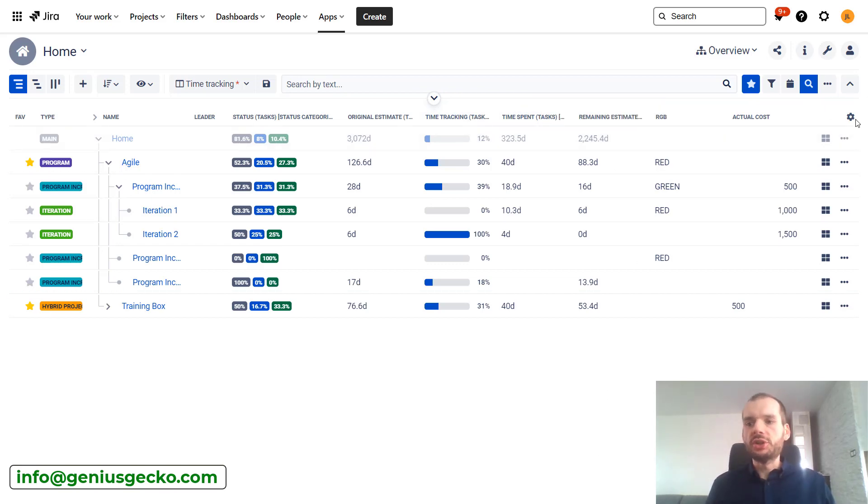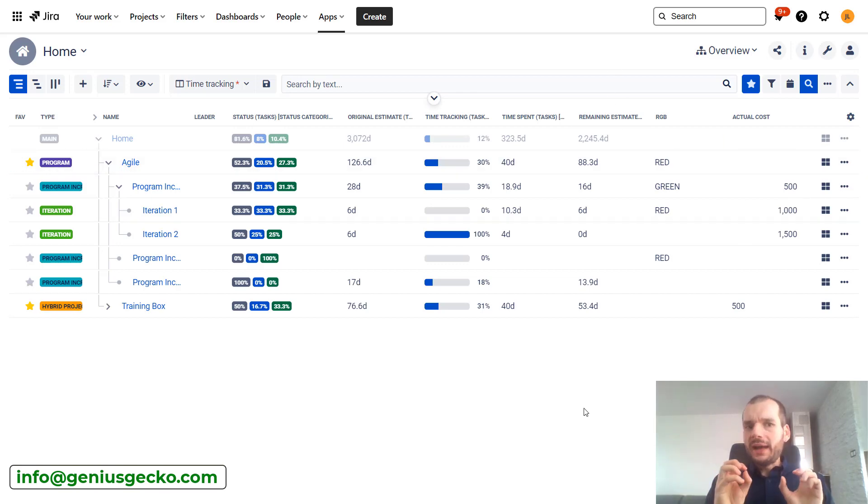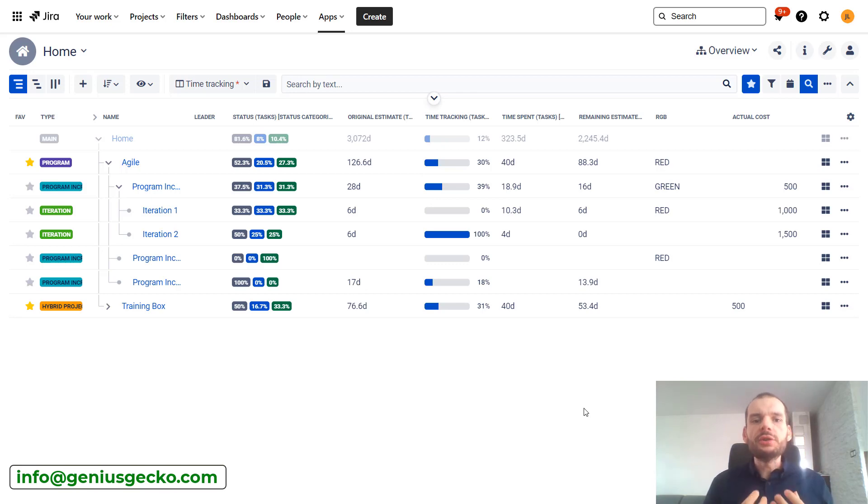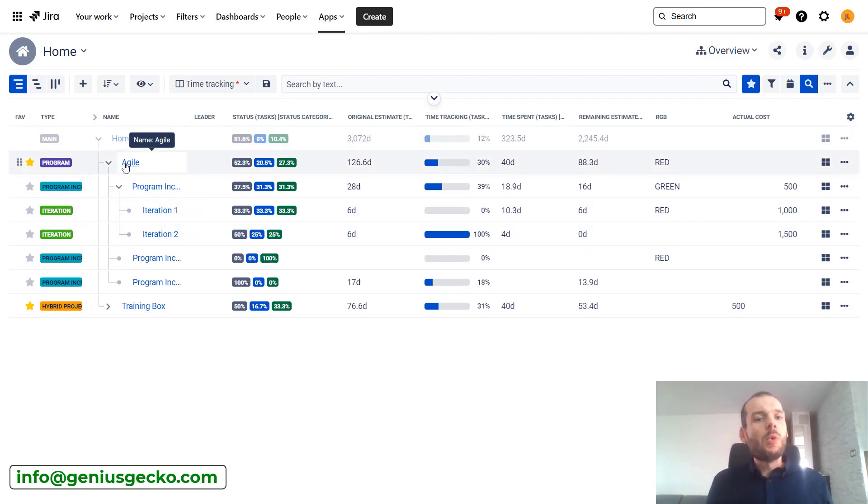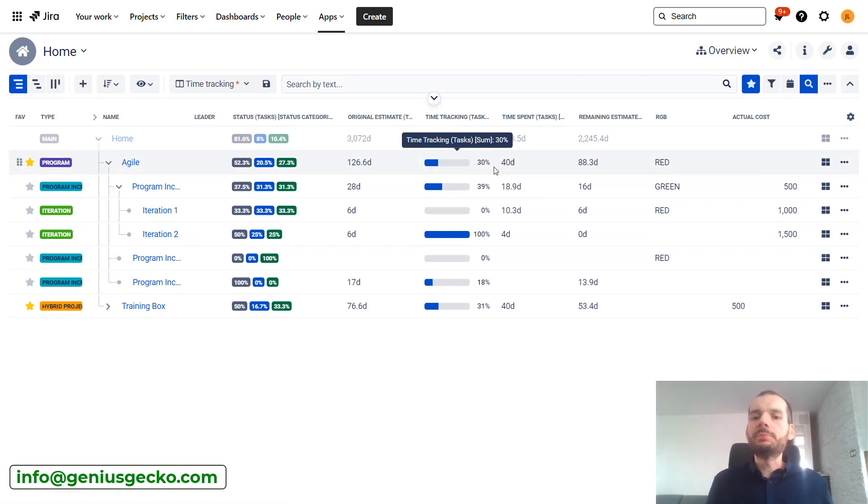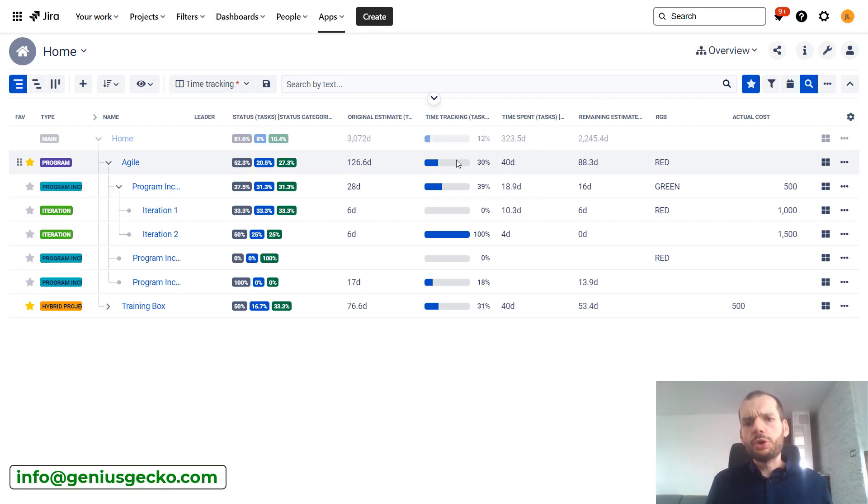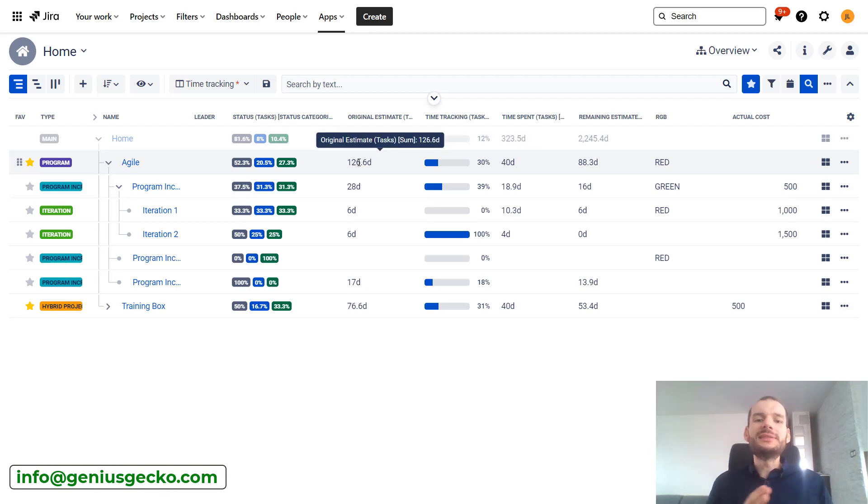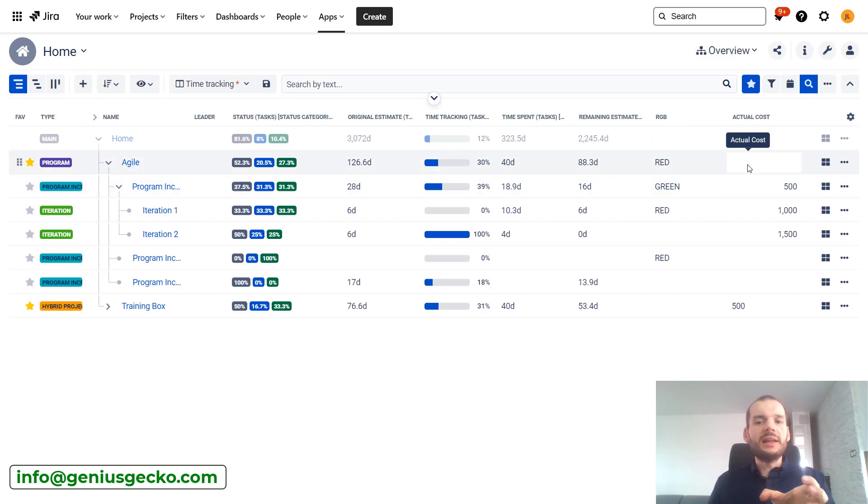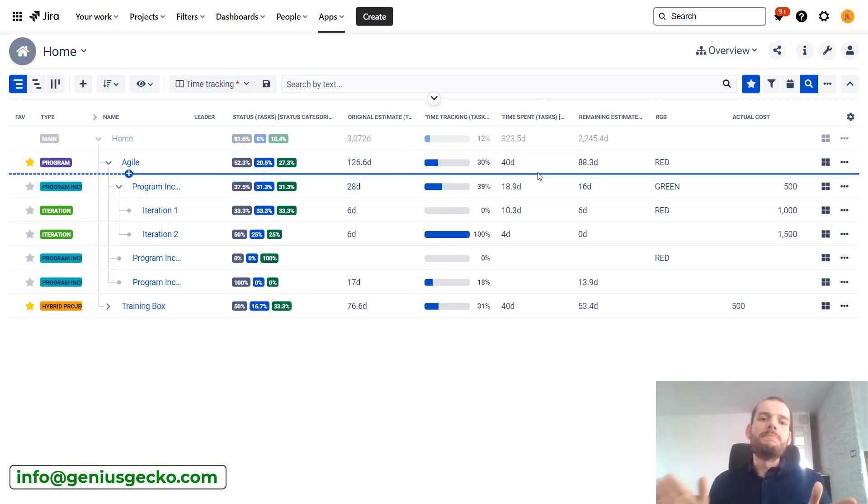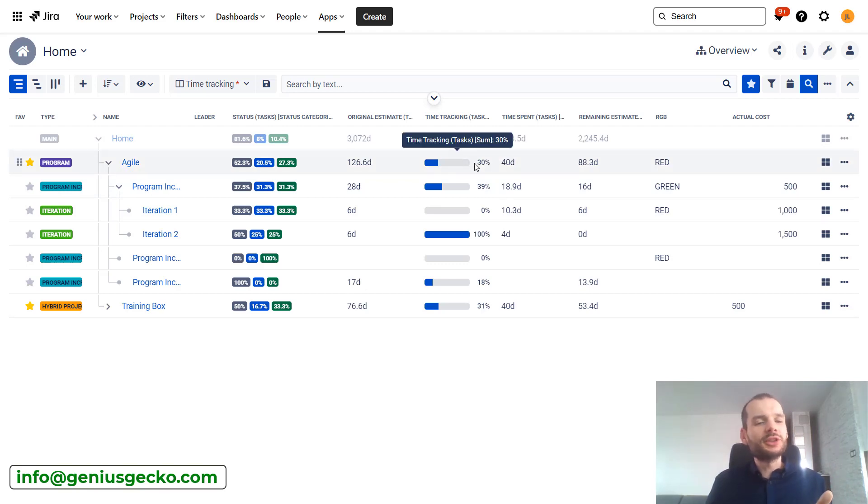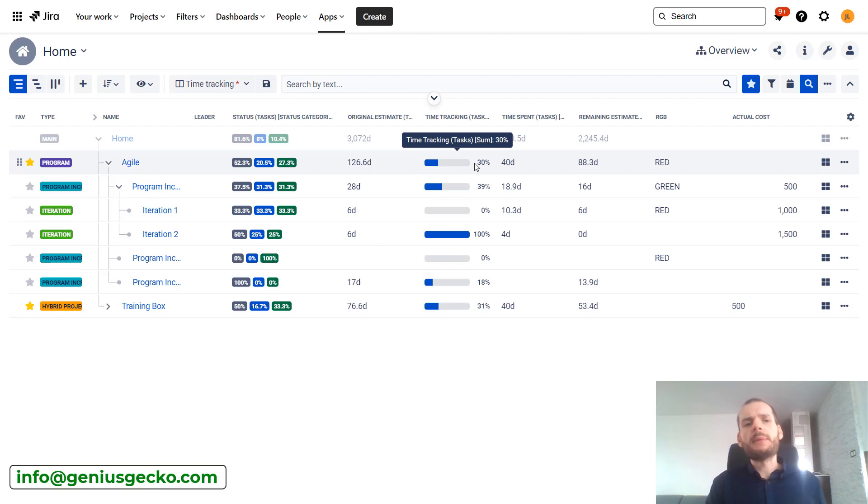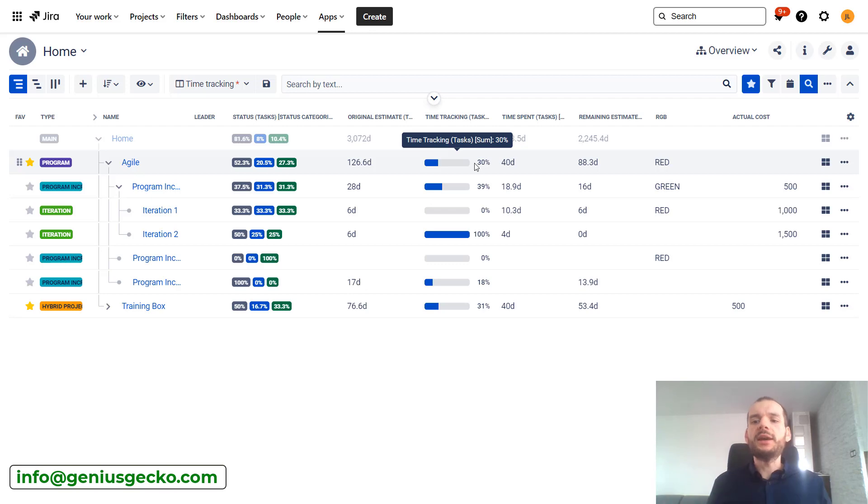I could also put start and end date of the box over here. That already gives us some indication of the progress. You can see that iteration two is basically fully done, which looks pretty good, while the whole agile project is only 30% done. We've basically done 40 days out of 126 planned. This is a pretty good indicator of what the progress is. If we put start and end date over here, we could see how it looks on the timeline - whether this 30% that we delivered is also more or less 30% on the timeline. Of course, delivery is not always linear, but it gives us some indication of the status of work within the box.